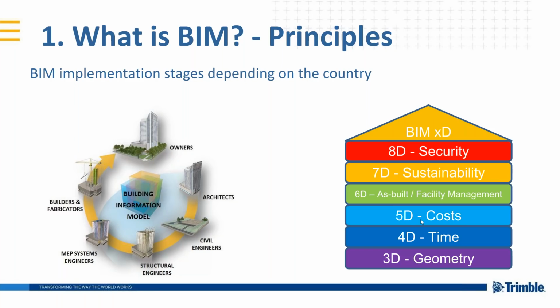And also, probably you have heard a lot about dimensions in BIM. Obviously we are moving here in the 3D geometry dimensions, but there are also some more. So it's important for you to have heard it at least once: the 4D up to 8D, the time, the cost, the facility management, sustainability, and security. But probably the most important for us, obviously, is 3D, but also the 4D and 5D, because there are some software solutions that you will use in the near future, or you are already using them, which make use of the 3D geometry and properties that we are providing in the BIM model to make some timing and cost estimations.